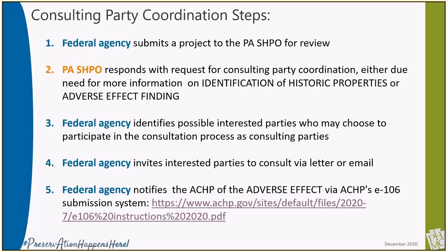Absolutely. I'd just like to say that in your invitation to consult, you should request a response, even if the response is, we don't care and we don't want to participate. We are eager to see the demolition of this property. We have no concerns. Whatever response they care to share that includes not choosing to participate would be helpful to have a written record of that. So in your invitation, you should request not just that they respond to you within 15 days, but that they respond to you with a written comment as to their desire to participate and any concerns they have with the project, because then you have the opportunity to print out those responses and make them part of your record, just as Russ suggested. So let's hop back into the steps.